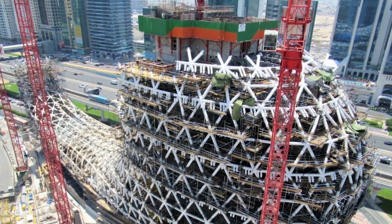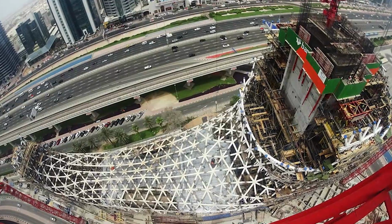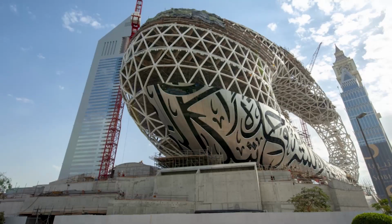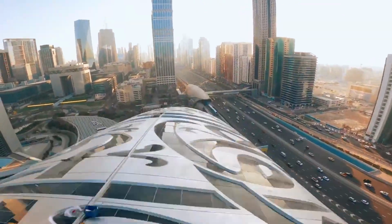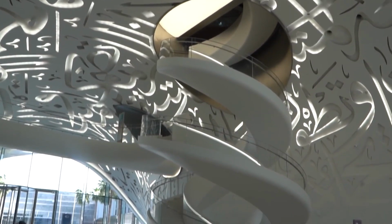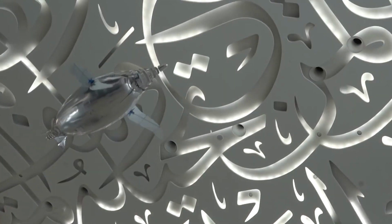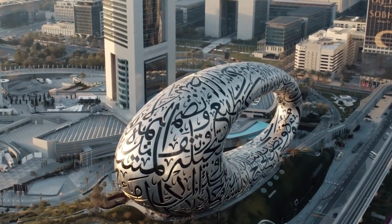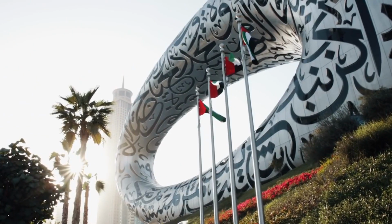Before starting construction, BAM Higgs and Hill and Eversendie Engineering performed a construction sequencing study and connection design for the structure, taking into account shifting stresses and loads throughout erection. "A lot of member alterations occur due to the construction sequencing analysis," according to Bali. "Because the diagrid had been optimized and modeled, none of the steel members were changed on this project," he claims.